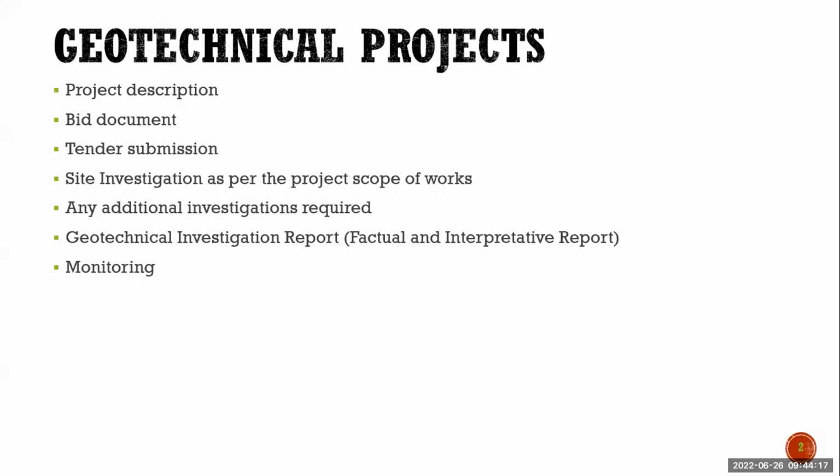Once the submission is done, the selection depends on whoever is lower, and also not only who is low, but in the technical perspective, who is giving the better options as well. Based on their experience in the proposal, they may propose something different and economical for the project. Whichever is a benefit for the client, accordingly, whoever submitted the tender, in economical and technical perspective, the bid will be selected.